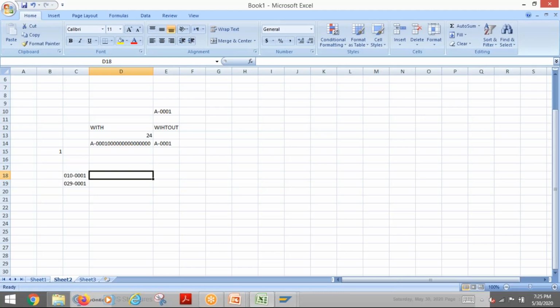But if I make any mistake, it will allow, right? No, there is a validation we can put. If the plant is like that, my first 3 digits should be this. Like that, you can put a plant. For example, I can put a condition: if plant is equal to 010, then the first 3 digits are equal to 010. Like that, you can put a condition. That way, you have to put a validation like that. If you are expecting your numbering to be like this, we can implement the validation.